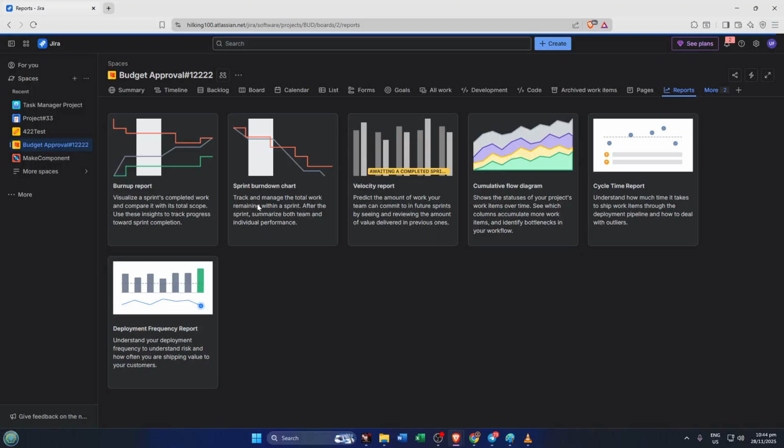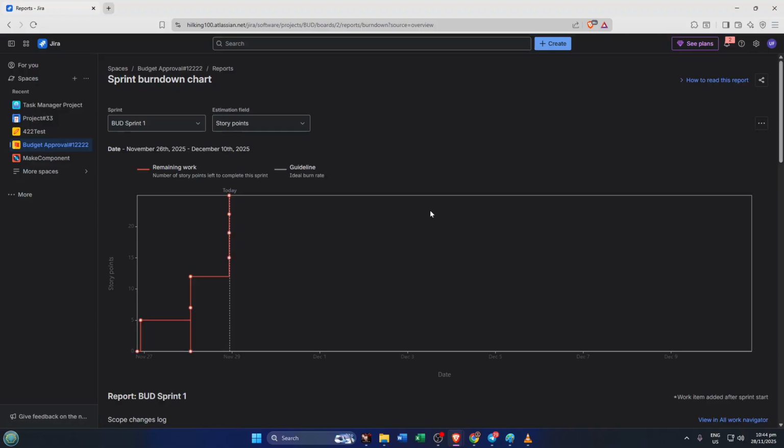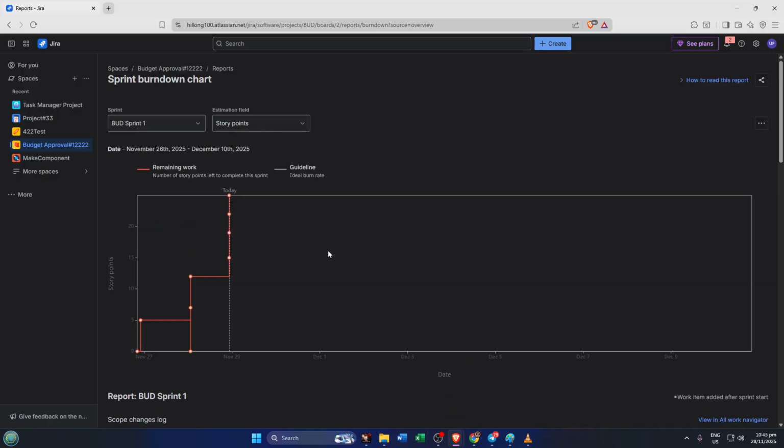We're ready to start a sprint and gaze upon that beautiful Burndown chart. Navigate to the Reports section in the left sidebar, select the Burndown chart, and voila! You'll be greeted with an ideal Burndown line that morphs into an actual Burndown line as your dedicated team resolves the sprint's committed issues. Guys, we hope you found this tutorial helpful and are excited to tackle your next project with the aid of a Burndown chart. Remember, it's not about ticking boxes, it's about being agile and adapting as you go.